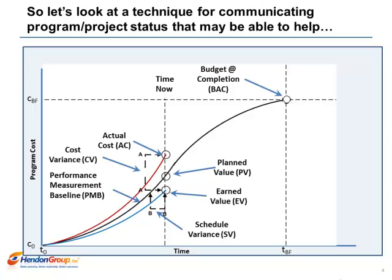I think it is much more useful to calculate scheduled variance by comparing the duration or date at time now with the duration or date when the value of work was planned. It is much easier for an executive to look at line B on this chart and see that the program is 30 days behind, 60 days behind, etc.